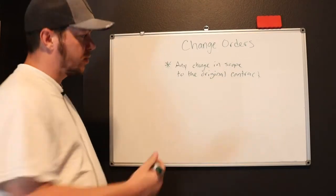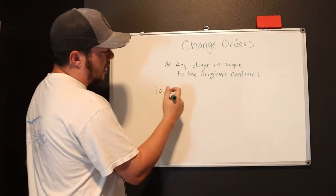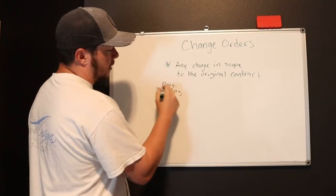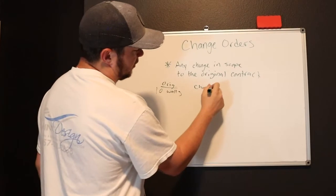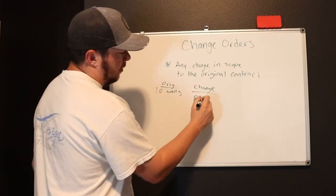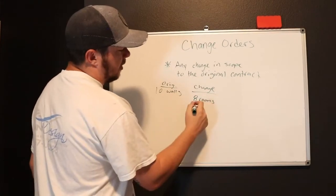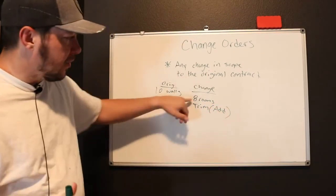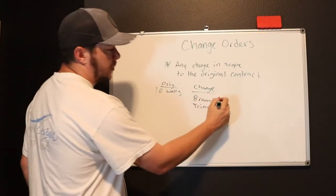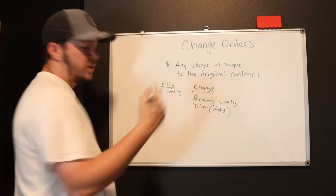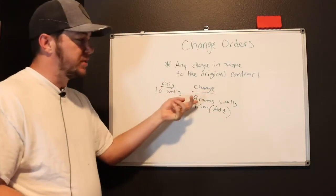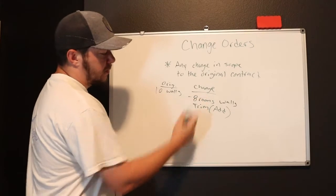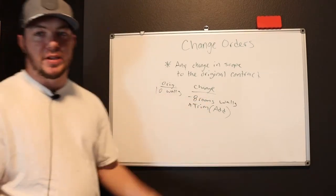So if the original contract says paint these 10 rooms, just walls, and the GC comes back and emails and says, look, we actually just need you to paint eight rooms and we need to add trim. So there's going to be a difference here in price—10 rooms versus eight rooms, walls. He comes back and says, well, actually we just need these eight rooms painted walls, but then we also need to add the trim in there. So you would basically deduct your cost for just walls for two rooms, and then you would add your cost for your trim, have the difference, and that would be your change order.